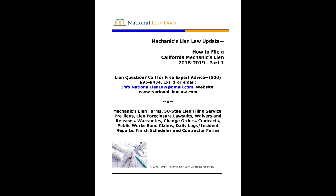Change orders, they occur on every project, right? Include in your mechanics lien the amount of all change orders or extras, whether signed or not. If you've been directed to do the work and do so, that is sufficient for your lien. As we all know, it is common for architects, construction managers, and other representatives to tell you to do the work, promise to sign a change order, but it never comes. In the meantime, you have performed the services and relied upon those representations. Many contracts say that you do not get change order work unless it is reduced to writing. However, under the principles of waiver and estoppel, if you are directed to do the work and either side refuses to sign the change order, you can lien for that amount.